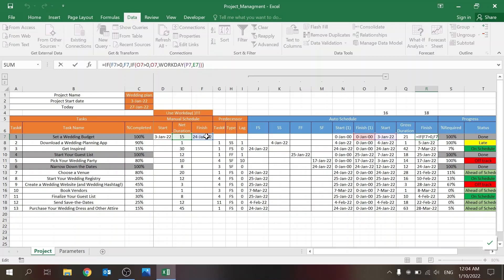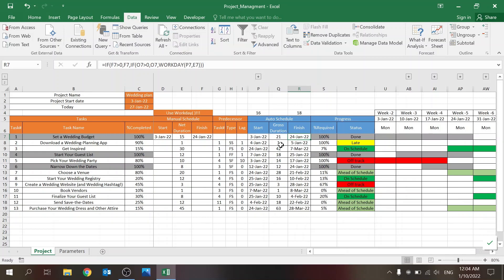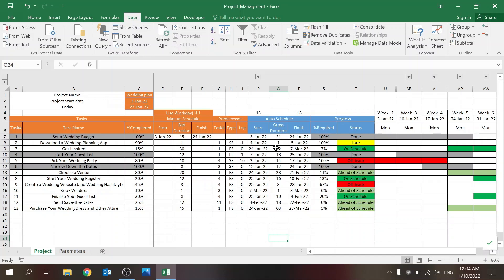The auto finish is very similar but uses WORKDAY with a plus. It checks: if there's a manual input, take that; if not, look for an auto finish; if not, take the auto start and add the net duration. Then you have the gross duration, which gives you the calendar days between the two dates — the difference is the weekends, so five working days plus two weekend days.